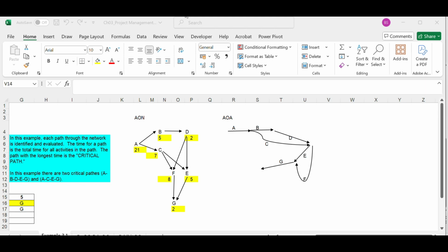Given we have the most likely time, most optimistic time, and most pessimistic time, we can have the effective time by summing up the most pessimistic time and the most optimistic time, and adding four times the most likely time, the whole divided by 6. That is (TP + TO + 4 TL) / 6. Effective time is the most pessimistic time plus most optimistic time plus 4 times most likely time, divided by 6.